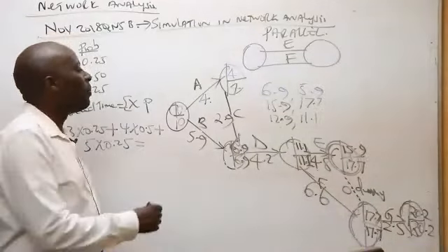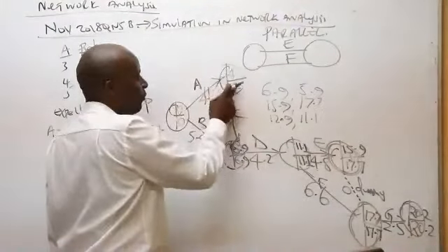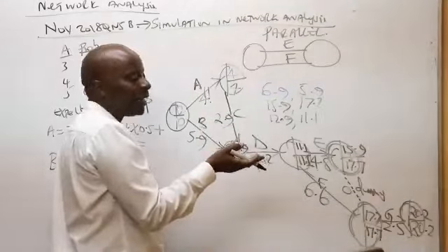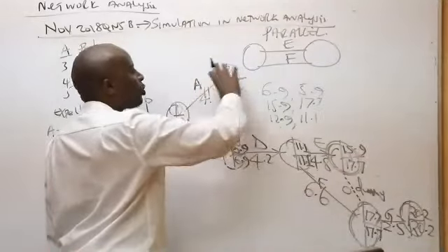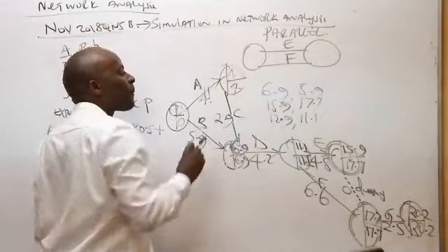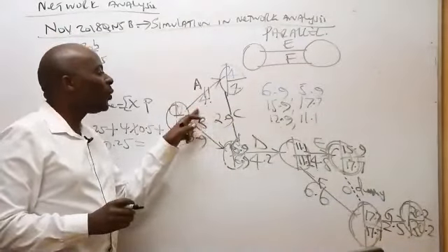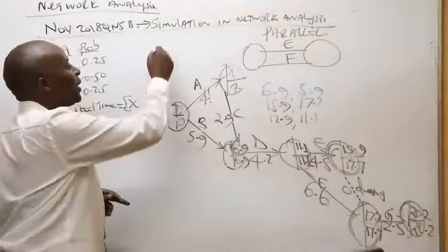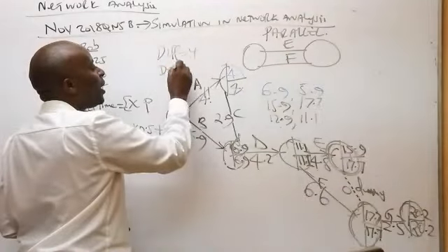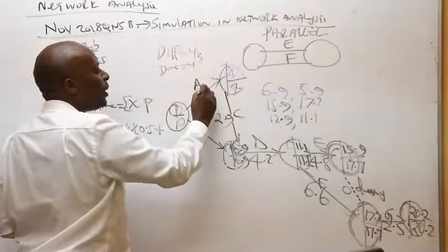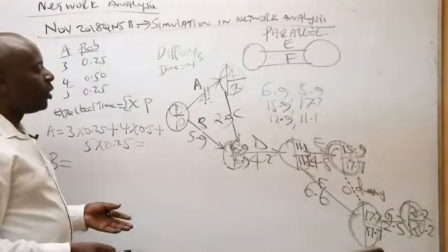Walter is telling me that Mwalimu, mark A. When you ask him why A, because of the similarity. So 0, 0, we have 4, 4. And then when you take the head minus the tail, the head is 4, the tail is 0. So 4 minus 0, we are getting exactly 4. And this exactly 4 that we are getting is exactly identical to A's duration. So the head and tail difference is 4, and the duration of A is 4. So they are coinciding. So it means that A must be what here? Must be critical. Confirmed.